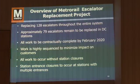So the first window we're looking at, once we start work, is to open this back up in August. That's what our schedule is looking at right now. We would be able to have it fully open back in August, because we have to take the opportunity not only to put all this rigging in place, and as I showed you, that corridor there is a staging area. We really don't have a lot of space to take away from the venues up top to store a lot of this material. And it is a lot of material to be stored. That's this August? Yes, this August.